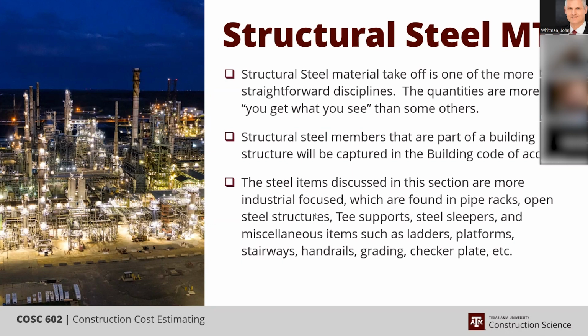So when I was with them, we would bid the concrete by a model. So a type 3, we would use the model to bid it. We didn't actually take all the components off, but with Cajun we would, because it was a lump sum. The work was smaller and every detail counted more. So it's two different approaches to the same end. If that helps. And whenever we would model it, the model included formwork. It included everything, the embeds, everything.